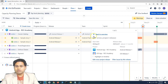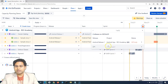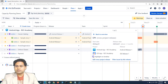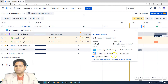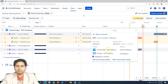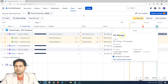If you go to the cross-project release, the one happening at the same time — you'll see the Android release is on 29th October. If I click on the cross-project release, you'll see it contains these two releases. The first one is off track because it needs to go on 29th October and is about one month off track, but the other one on 31st December is all good and doesn't have any issues. The cross-project release helps you track all related releases together.